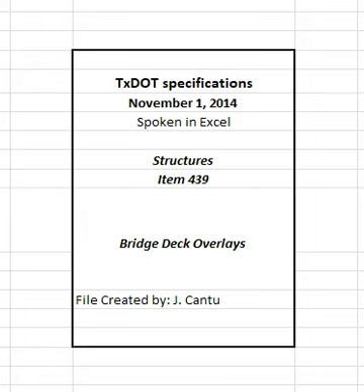Repair of deteriorated concrete below the level of scarification will be paid for in accordance with item 429, concrete structure repair. Concrete removal and surface preparation beyond cleaning utilizing air, water, and abrasive blasting will be paid for in accordance with item 483, concrete bridge deck surfacing, when overlaying existing bridge.